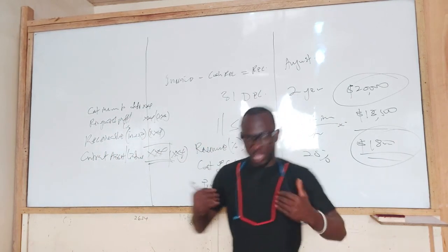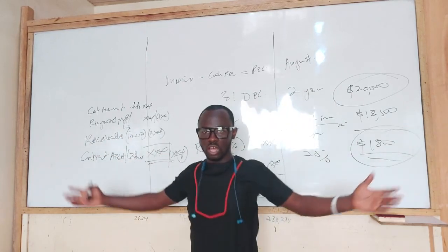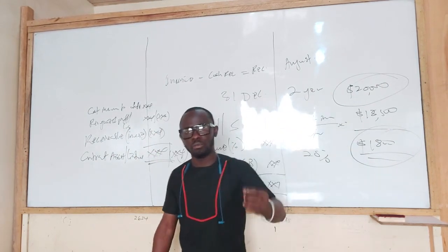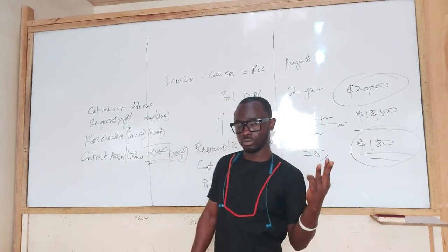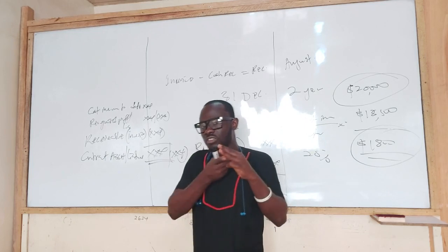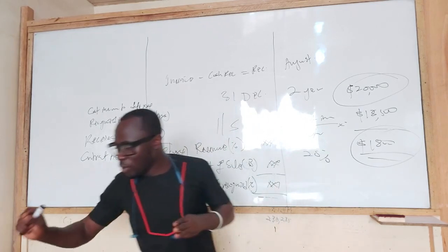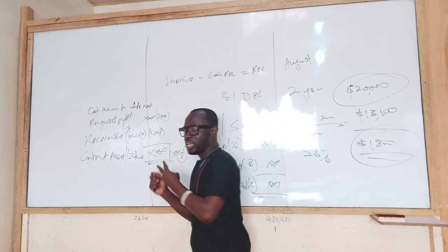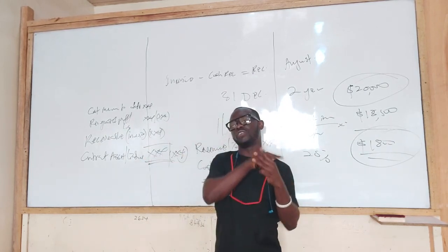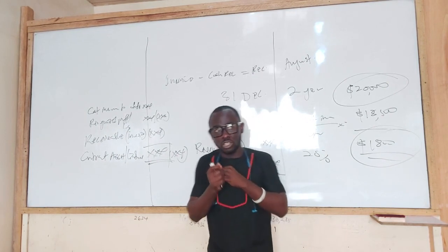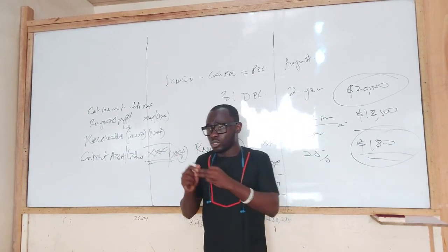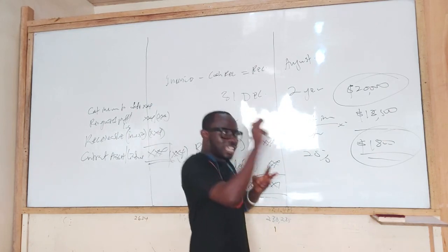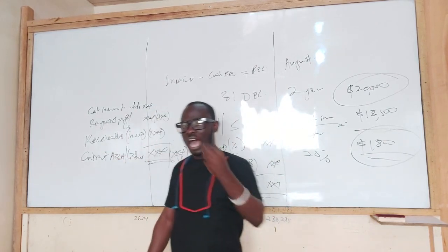So if we have been contracted to do a lot of projects, maybe at a certain location or in a certain municipality, we are building toilet facilities, we are building hospitals, and we are constructing roads. The standard says that for the construction of these different assets, we would treat the expenses and treat everything as a separate contract when we submitted a different proposal for each of the contracts. That's very important. It means we submitted a different proposal for the toilet facilities, for the hospital, and for the construction of the road. Then, in that case, since they all have different proposals, we will treat each contract as a separate contract.